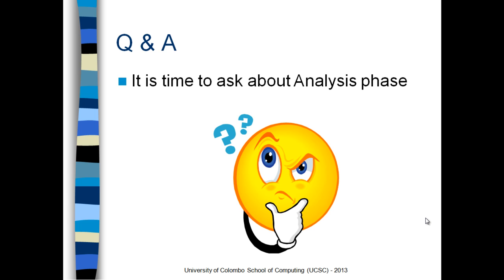Then within each module, you identify a set of requirements, and you see some similar requirements. That's the way you have to start. You can start with the functional requirements, identify the functions based on the modules, then try to integrate them. Sometimes after the analysis you may decide it is not possible to implement all modules, so you select some of the parts. And some of the requirements you may not consider as part of the scope of the project.